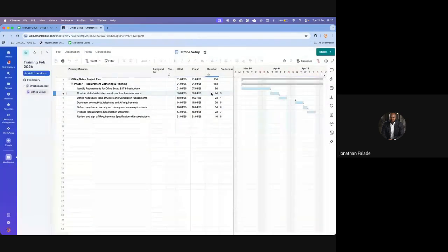They would have the one source, which is going to be the baseline, but then they will have other little versions where they've made a change here just to see how it would run. You understand? So what we could easily do is say, okay, if this activity is delivered late, doesn't come, whatever, what would be the impact? And then we can easily see that impact because we have placed in there dependencies between the activities and everything else, so we know what is going on.